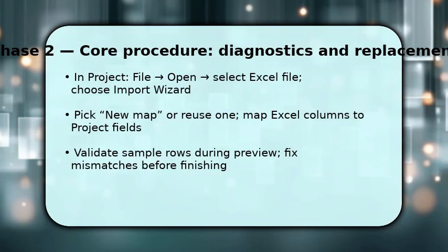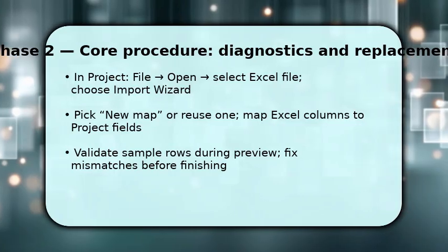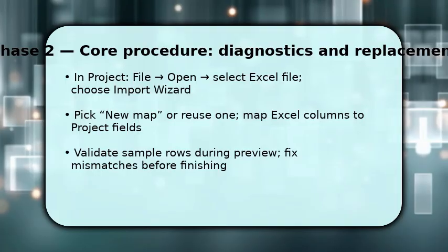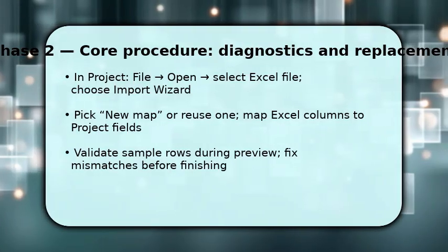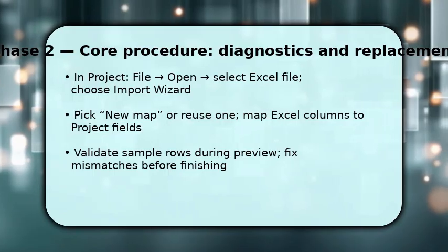You now import using Project's Import Wizard so data lands in the right places. In Project, choose File, Open, and select the Excel file. The wizard asks whether to create a new map. Pick New Map if this is your first time, or reuse an existing map for consistency.